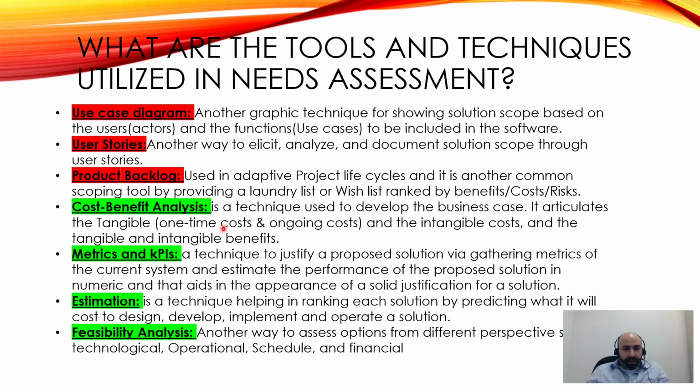Cost-benefit analysis. Cost-benefit analysis is a tool and technique utilized in needs assessment, and it is used to develop the business case. In the cost-benefit analysis, the tangible one-time costs and ongoing costs are listed, and the intangible costs are also listed, and the tangible and intangible benefits are also listed.